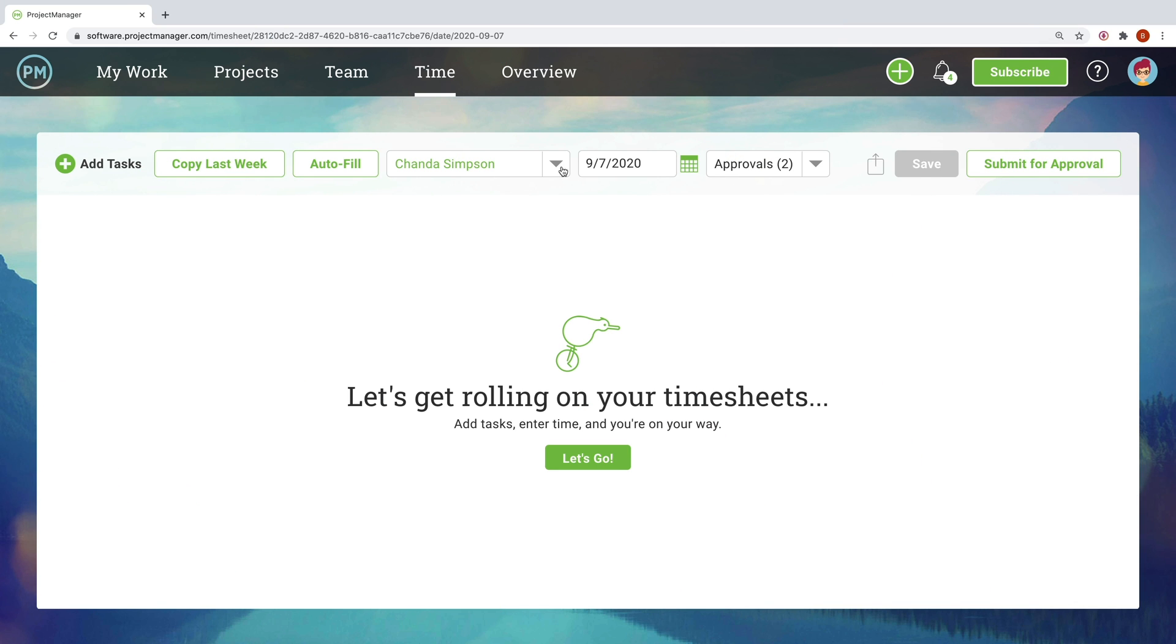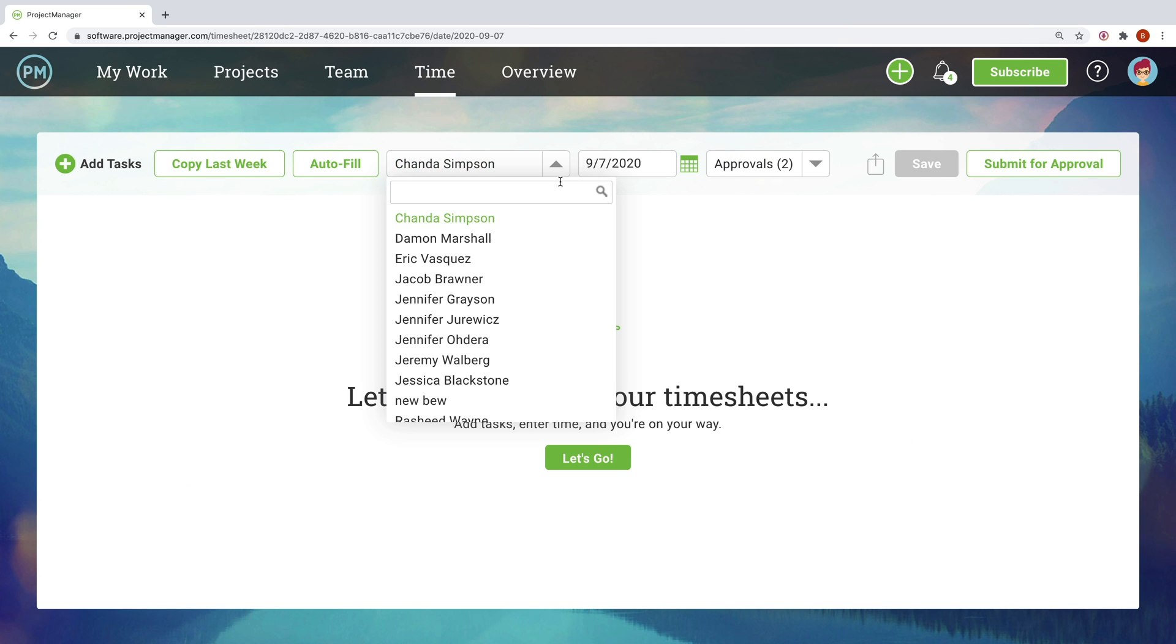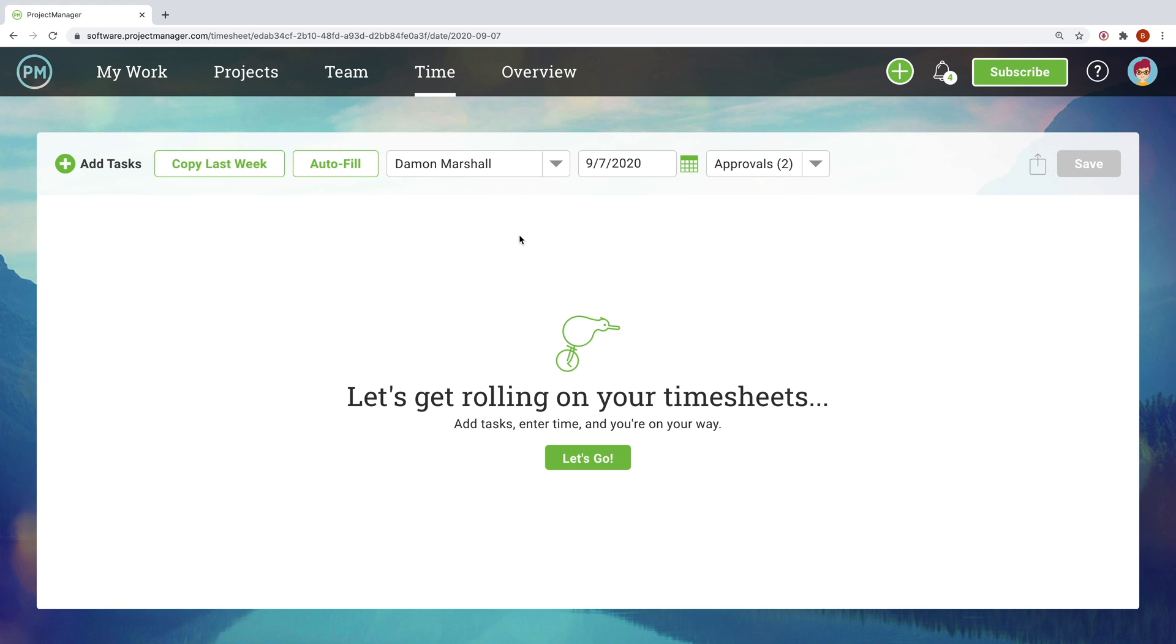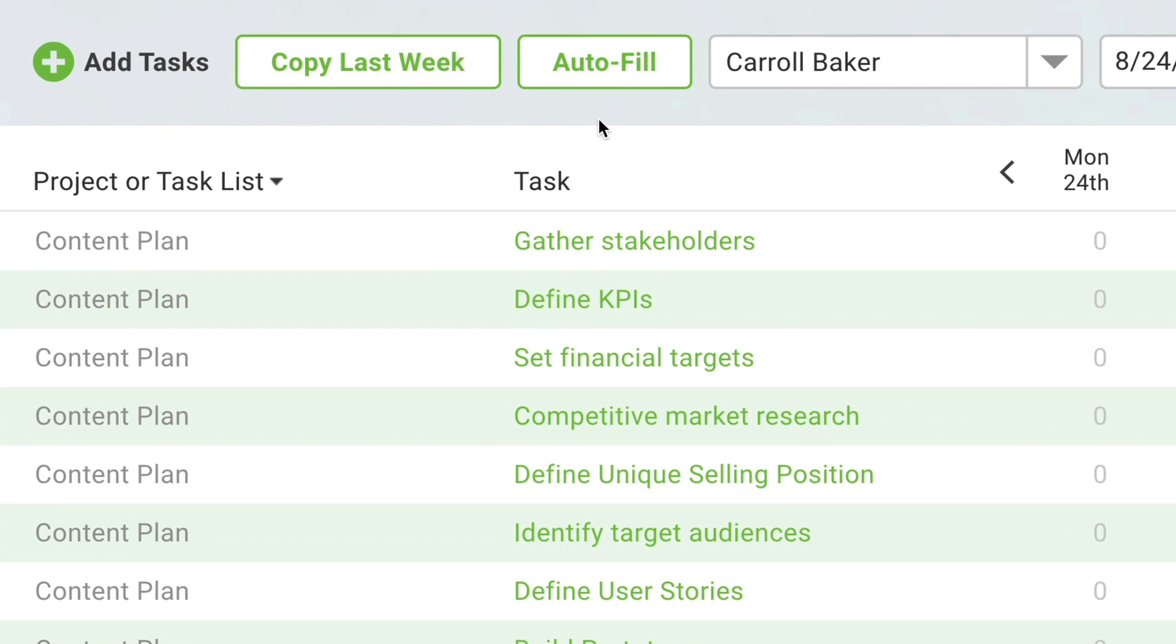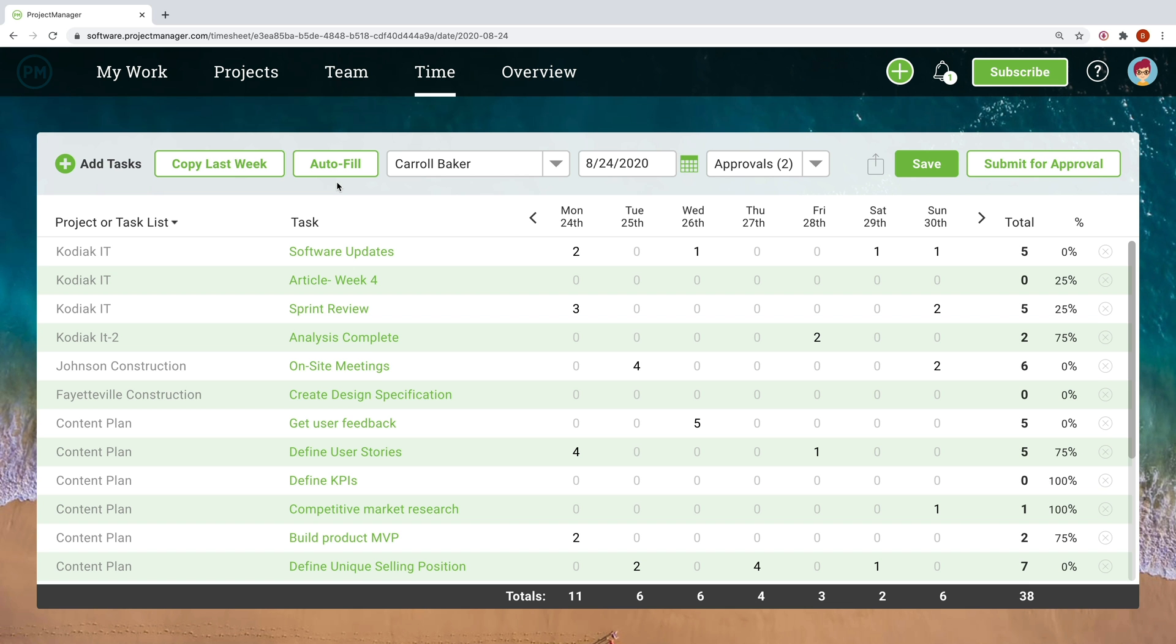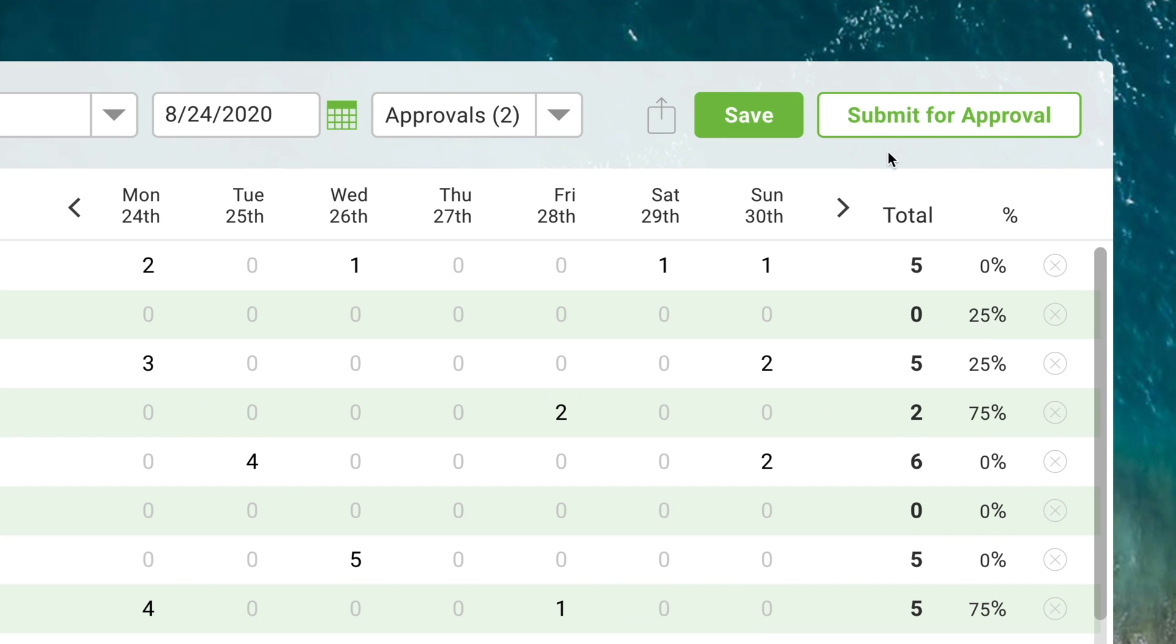Besides getting employees paid, PMOs need timesheets so they can compare actual hours worked to their original plan. Projectmanager.com takes the hassle out of timesheets by letting teams auto-populate them with the click of a button, keeping things accurate and easy.